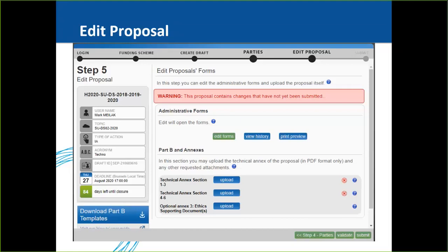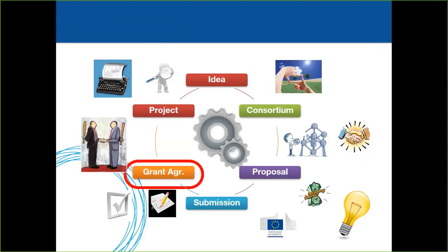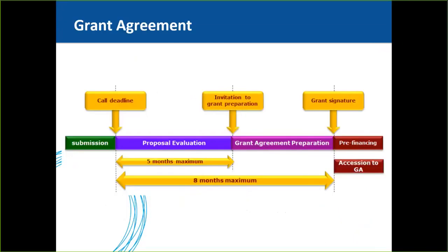Once you are ready to submit, make sure you have validated the proposal before pressing submit — the validation will flag any errors that need to be addressed. The commission is legally bound to evaluate proposals within five months. After the submission deadline passes, the commission has five months to provide feedback to the coordinator about the project outcome.